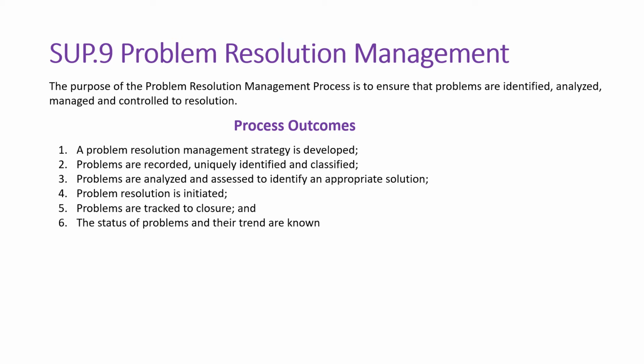If you have 10 issues or problems in a tracker, each issue will have its own assessment, its own identification date, its own closure date. Based on that you will get the trends: how many issues were identified till that moment, and how many were closed by that moment. This is how you get a trend out of the issues.